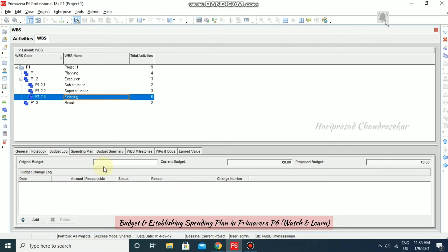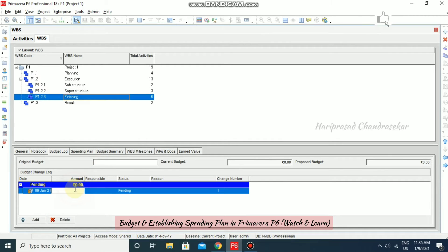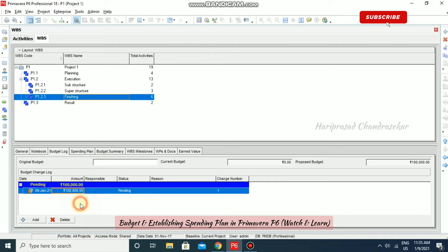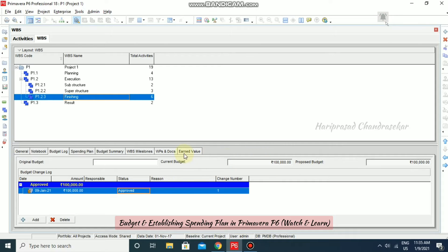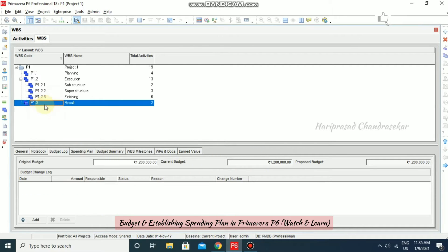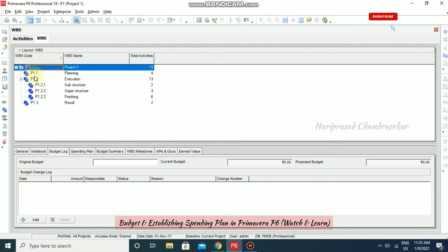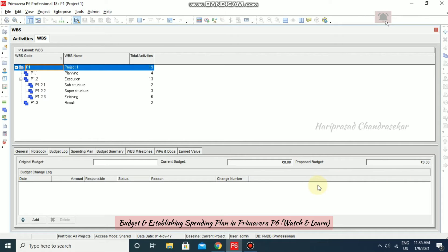For Finishing, I am adding 1 lakh and setting it to Approved, so we have another additional 1 lakh in the budget. So in total, for our project, we have added the original, current, and proposed budgets across all WBS elements.